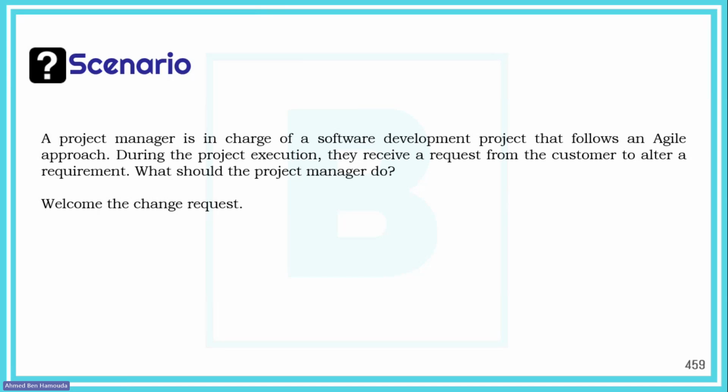So as a solution in order to accept changes easily, even in the sprint, without waiting for the next sprint, the month after, we decided that the sprint itself will have three or four planning meetings. For each week, we'll have a separate planning meeting of 2 hours. So for 2 hours, we plan the work we will do in that first week.